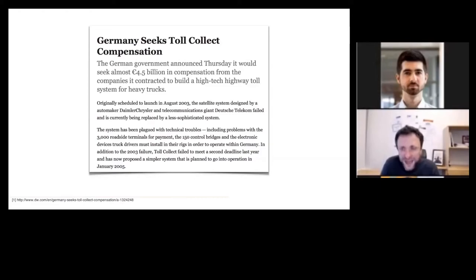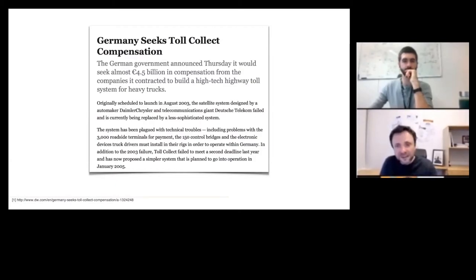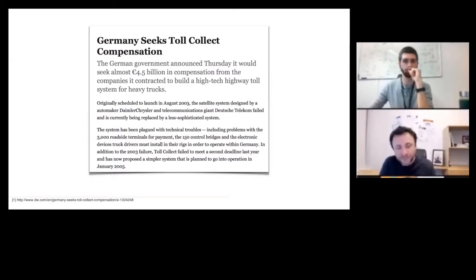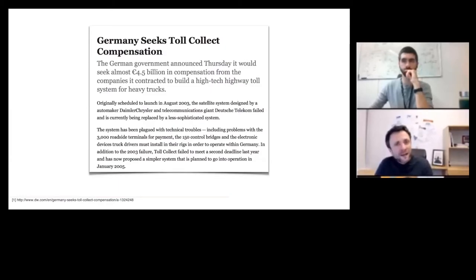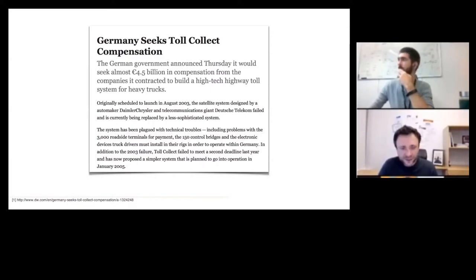One thing that unfortunately happened is that one of these stripped requirements — which you could not really see directly from the requirements themselves — was responsible for facilitating a wireless interface important for patching the system. They rolled out that system, it finally went live, went to production, and then after a couple of months, when they were ready to update the system, they figured out they could not patch it wirelessly. They had to call in thousands of trucks back to the garage, take the sensor manually, and update it manually with a cable.